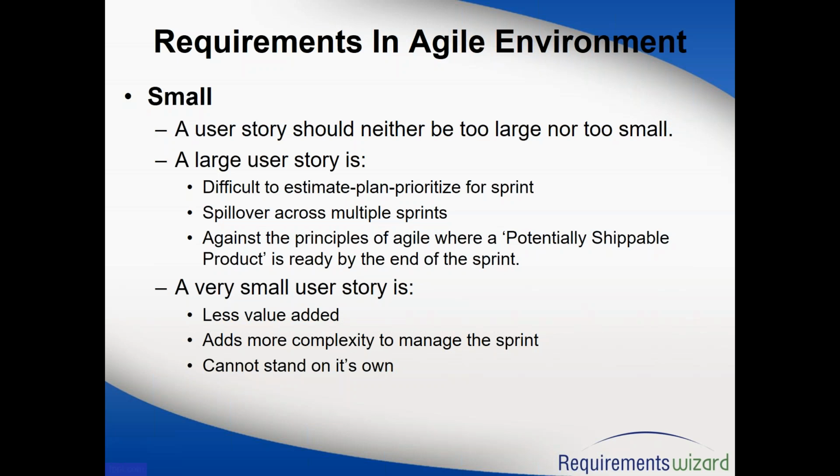The reason is, if it's a big story, it is difficult to estimate. People cannot estimate. If I tell you to estimate the entire system, that's difficult. But if I tell you to estimate how much time it will take to create one form on the screen, it's much easier, correct?